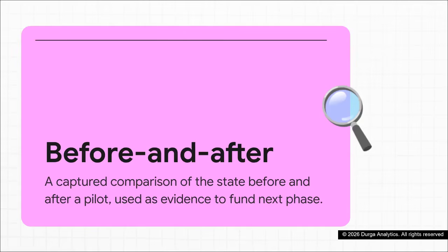Of course, a win only really counts if you measure it and communicate it, and that is where the before and after comes into play. You need to capture a clear comparison of the state of your data before the pilot and the state of your data after. Why? Because the evidence from your pilot literally becomes the business case for your next phase of funding. If you don't capture the hours of manual rework you just saved or the specific quality score you lifted, your sponsors simply won't understand the value of what you just accomplished.